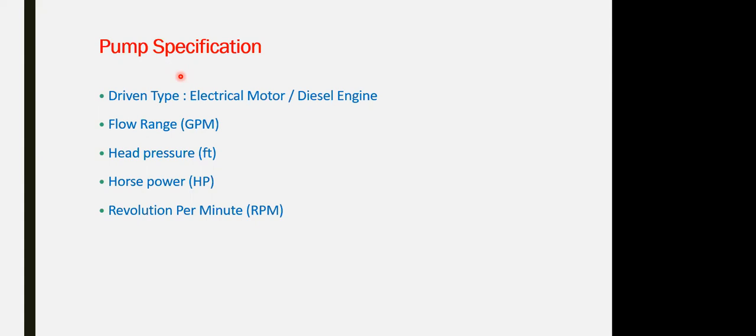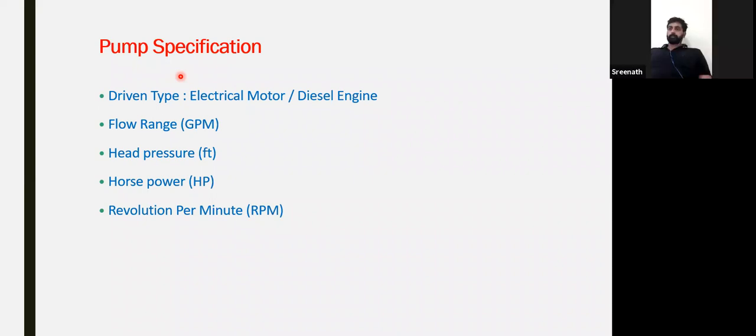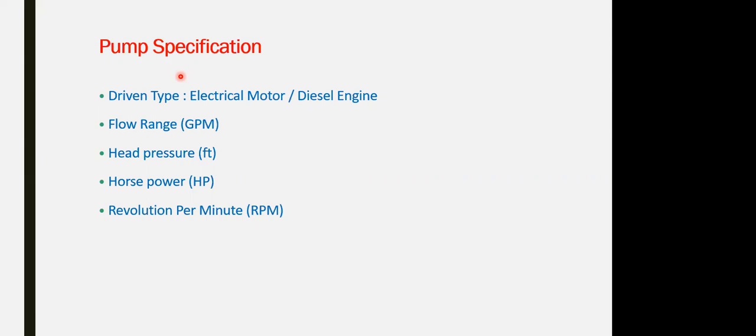The important thing about the civil defense talking about the fire pump is that they will test the categories of the pump itself, the type, the brand, whether it is pre-approved from the civil defense or not. If the manufacturer doesn't have an approval for the type and the country of origin for the fire pump, you cannot install it. You cannot ship or dispatch it from the factory. It has to be approved first. You will not get clearance from the customs here if it is not approved. When you deliver, you have to attach the approval and certificates from the civil defense.